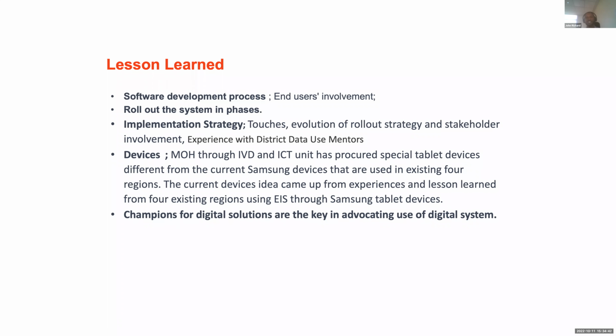We started with an internal approach, where PATH implementation specialists go and train healthcare workers, but we came to realize it was slowing the rollout process. Then we came up with a different strategy where, for each district, we formed TOT or district immunization mentors who are trained, and then they go to provide capacity. So this also created ownership and sustainability.